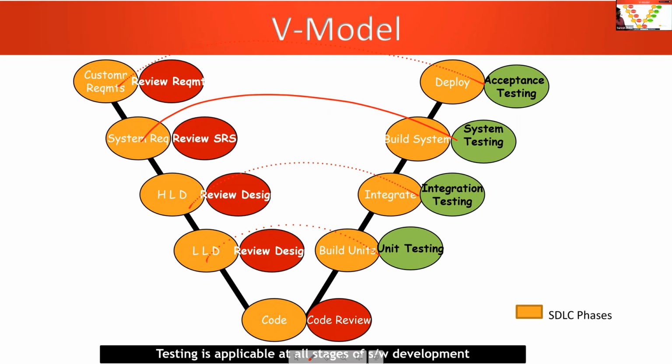For such a critical application, the project manager will say we go with the V model, very carefully: every development activity, verify then go, verify then go. After one activity, do not go for the second step. Check whether the work was accomplished correctly or not. Yes, then only go for the next step. Such a development approach is called the V model, and as the final diagram looks like a V shape, people named it the V model.